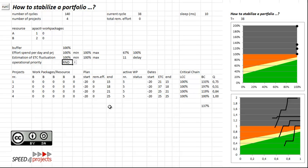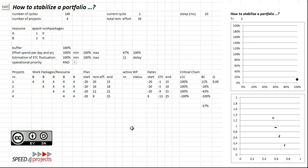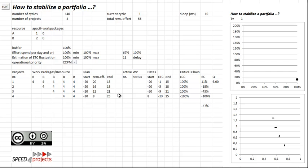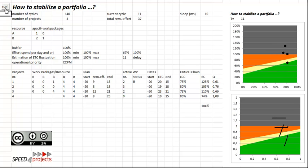Now let's have a look at what Critical Chain does with such a portfolio. Just switch over from random operational priority to Critical Chain. It must be clear what happens in Critical Chain: the worst projects get all the attention and the resources, and the best has to suffer a little. If everything goes well, the portfolio stabilizes and the results are more predictable.